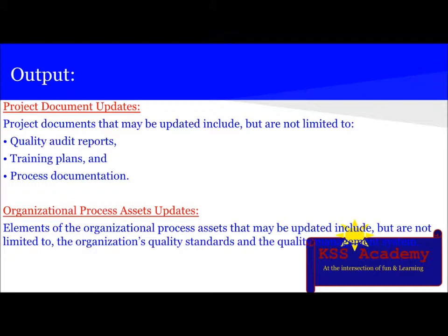So let's do it again. Quality assurance versus quality control. Quality assurance deals with audit, processes, assurance, client or QA department, and executing process group. Quality control deals with inspection, deliverables, eliminate causes, team or quality control department, and controlling. So you need to understand and remember the difference between quality control and quality assurance.